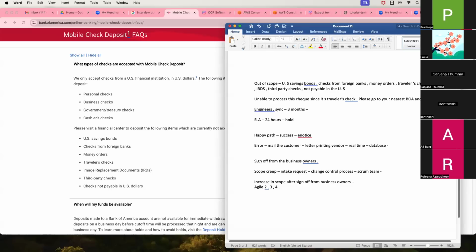So when it comes to agile, it's not like waterfall. Even if you get sign off, your requirements are constantly going to change. That's why we have this sprint model. But at maximum, try to get 99% of the requirements before the start of your sprint, and for the next 4 or 5 sprints have all the requirements, user stories in ready status.